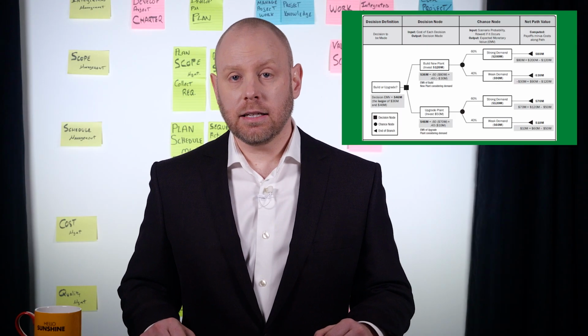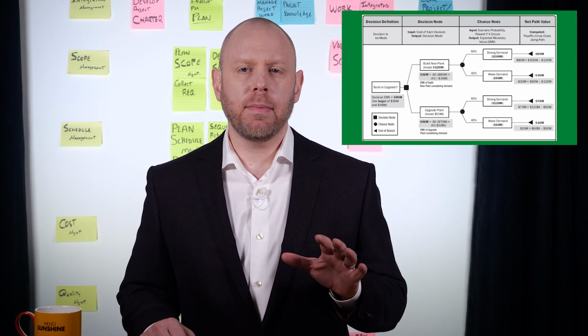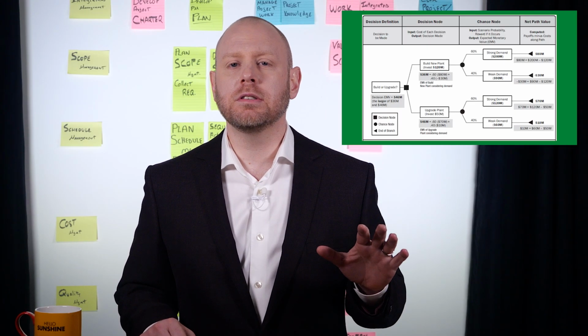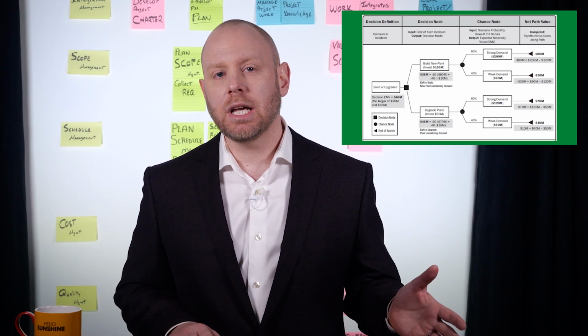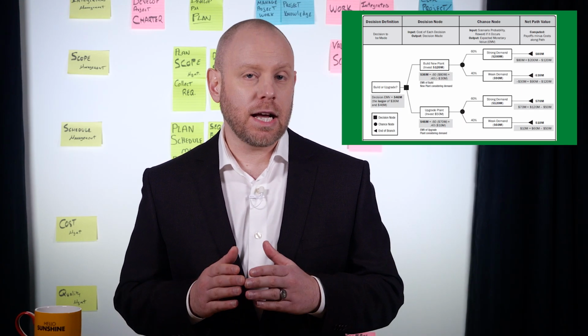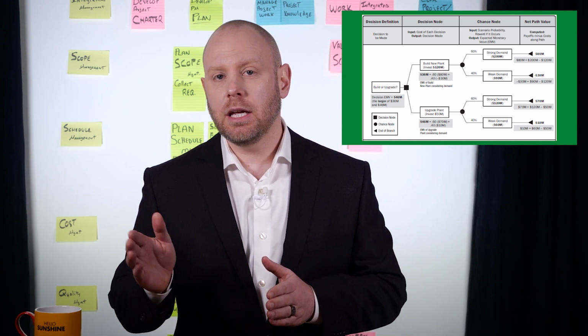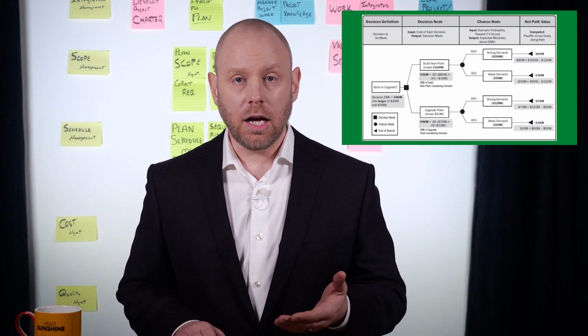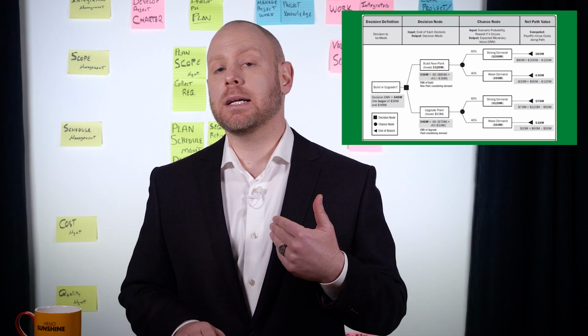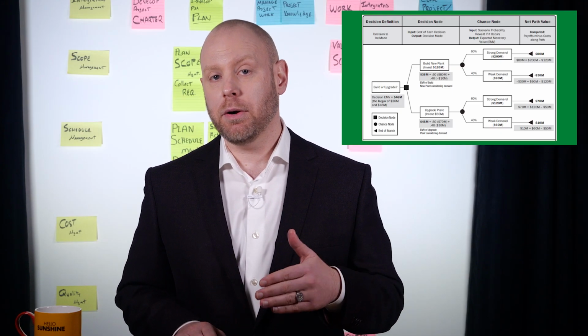A decision analysis is a network diagram that displays alternative courses of action. Each path or branch of the tree shows a decision node, course of action A versus course of action B, and then a chance node that indicates the probability of outcomes and the expected monetary value of the output.